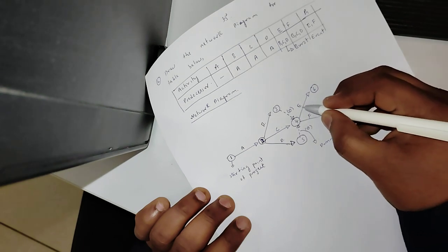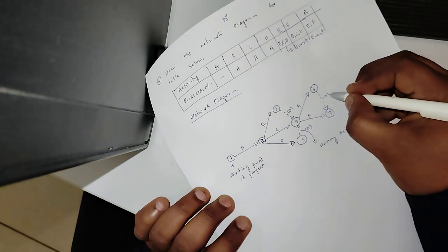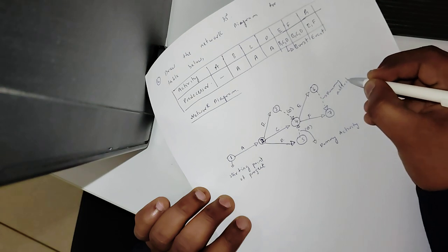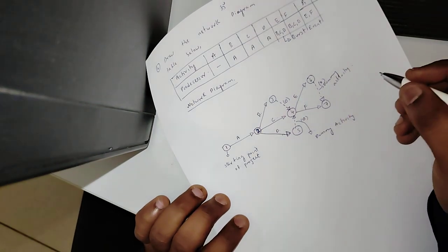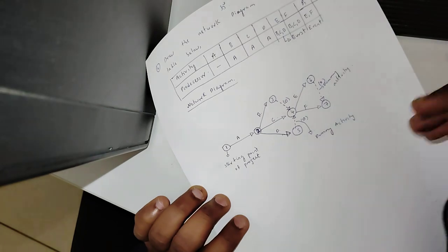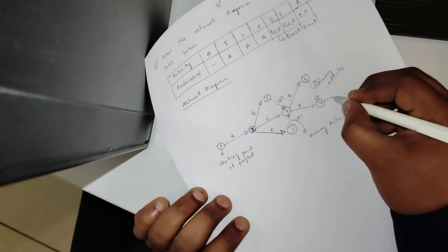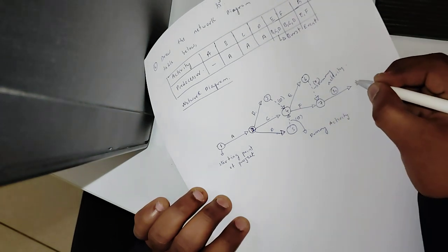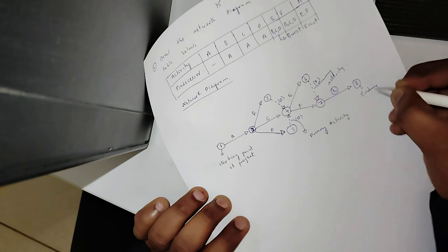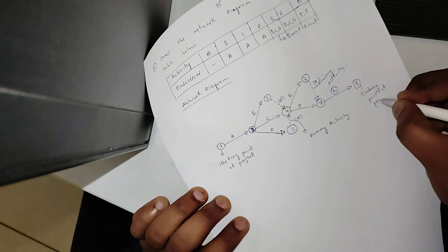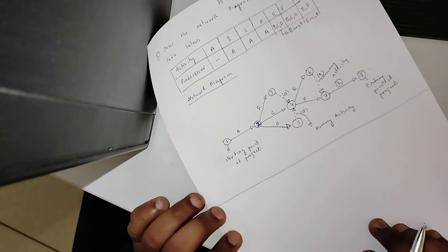So the network diagram should be completed. Here E and F are here. Once the E activity is completed, I am showing the dummy activity here. This is also called a dummy. As I told you, a dummy activity has zero time and zero resources for the project. Next, from E and F, the activity G follows. This 8th event is called the ending point of the project. So this completes this problem regarding the network diagram.